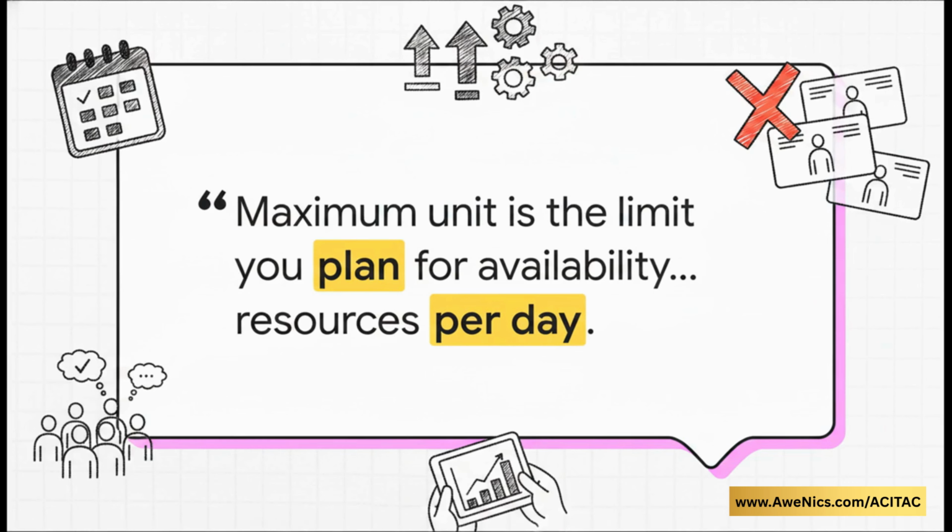This is absolutely crucial, because if your schedule ends up having 3 overlapping tasks on, say, a random Tuesday, and they require 10 laborers each, meaning you need 30 total, MS Project is going to throw a red flag.